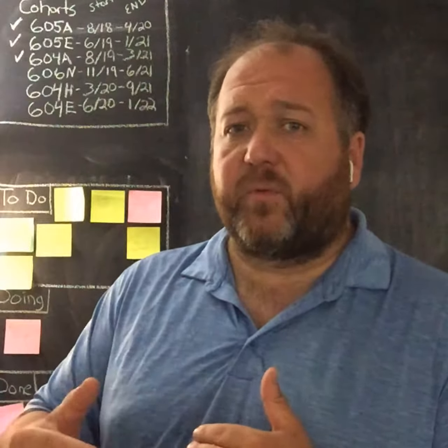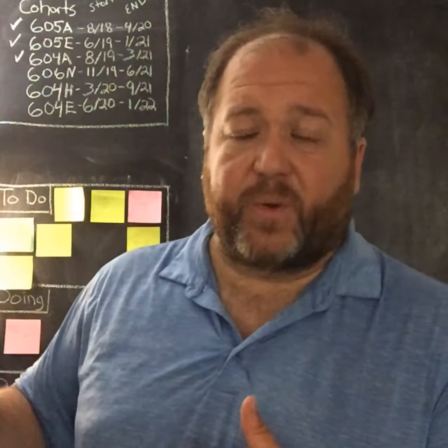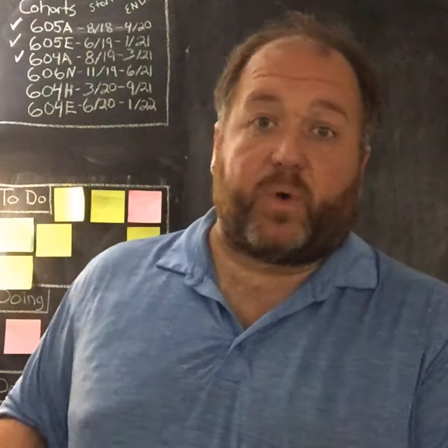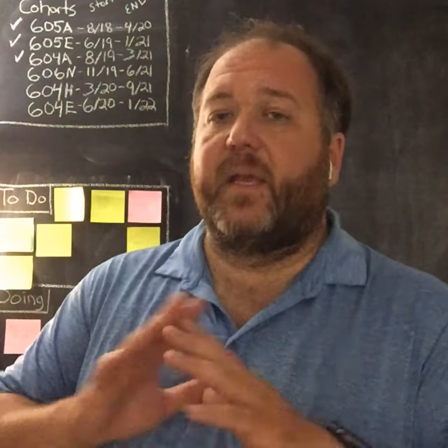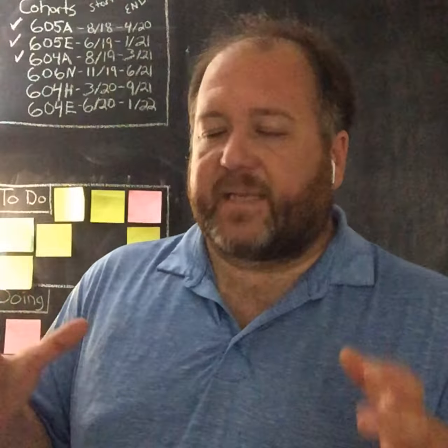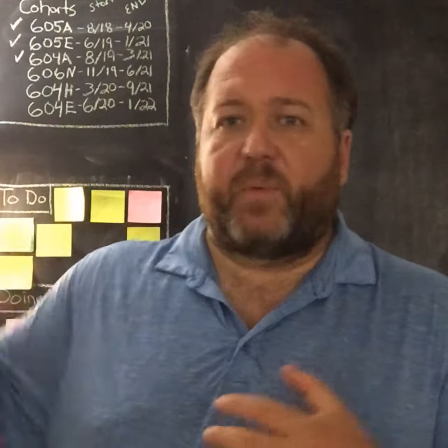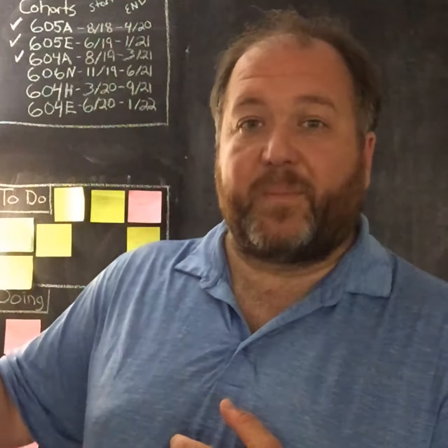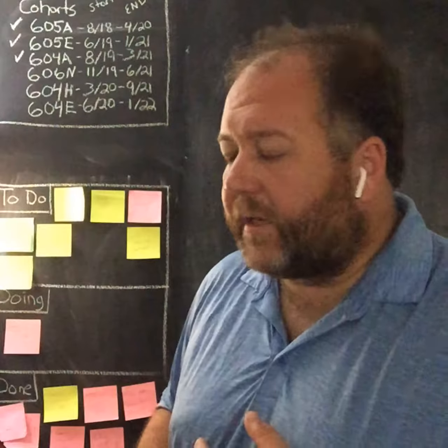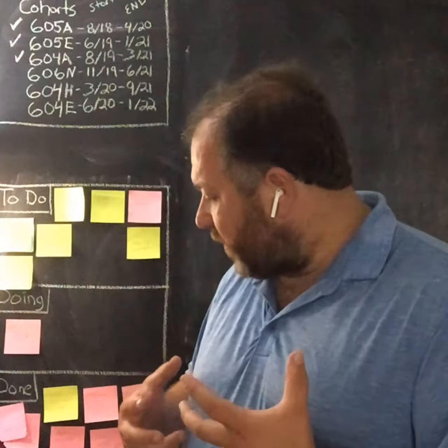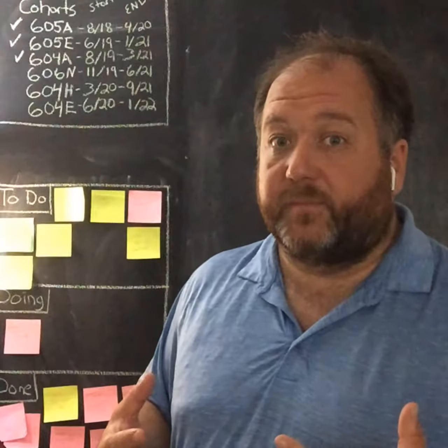So you'll want to make sure that you set those exclusions down explicitly, because the last thing you want is to be midway through a project and have people start showing up with courses to load on the LMS or courses to develop for the new LMS. Set those up as exclusions to the scope, and when people come for those things, you can help them set up their own project, a separate project with its own budget and its own timeline. So exclusions to the scope is critical.